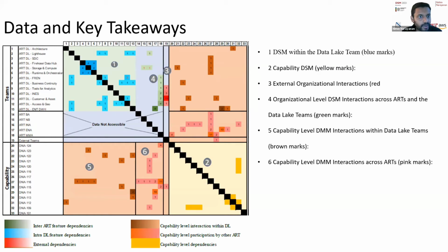And one key important factor that the product manager had highlighted was this small red line, the part 3 of the DSM, which is the external dependencies. So external dependencies are with teams that are outside the purview of the organization, maybe an external vendor. They run in different cycles, not aligned with what the organization in question is running.